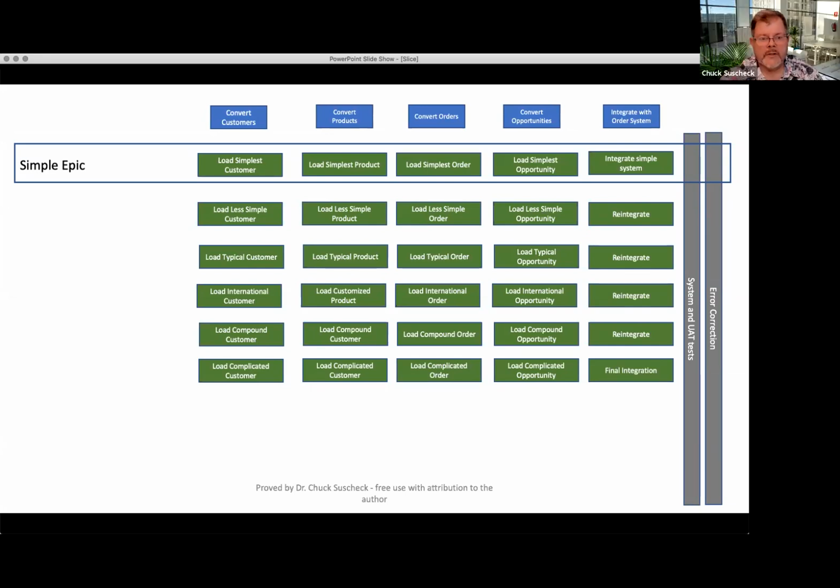One of the things to be careful of is I always say, defer constraining commitments until the last responsible moment. It's one of those concepts in Agile. What it's saying is, if you have some sort of decision that's going to make you go down a particular path, ask yourself if you can defer making that decision and thereby learn more and make a better decision.